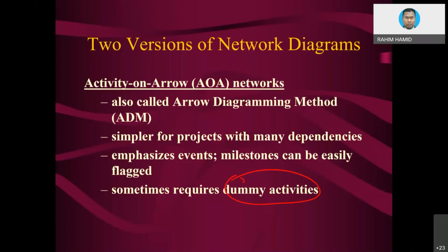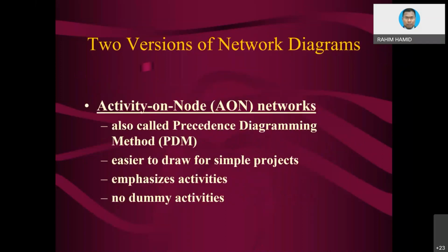Later on, we do have slides that tell us about AOA diagram, but I just want to introduce the concept first here. Activity on node diagram was invented after they invented the AOA diagram. And then even AON diagram later on was modified into an enhanced version, and subsequently it is called PDM diagram, or sometimes we just simply mention PM, precedence method. It's quite the same thing. Easier to draw for a simple project, emphasizes activity, and there is no dummy. Later on we are going to zoom in on these two important things.